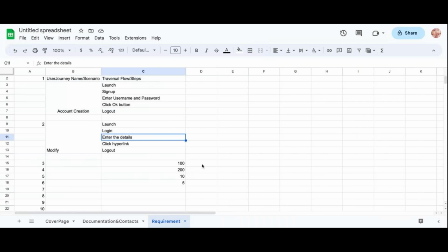So basically we will plan three rounds of test. First test, second test, third test. But definitely in the middle we'll do some debug test. Why I'm saying this: if you do the first test, you will face some issues. What will the team do?